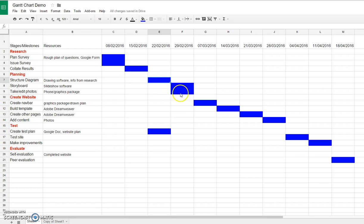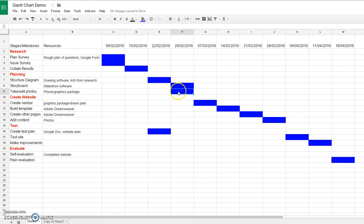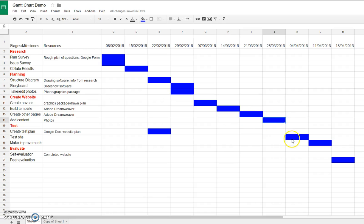You would need to work out which tasks could be done at the same time. I've got two tasks, the storyboarding and the photos. I think I could do both those in the same week, and which tasks I can't do until the previous task is finished.